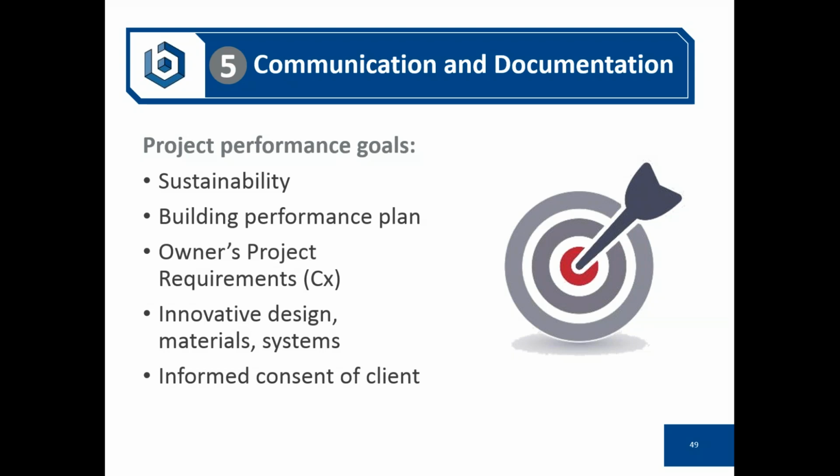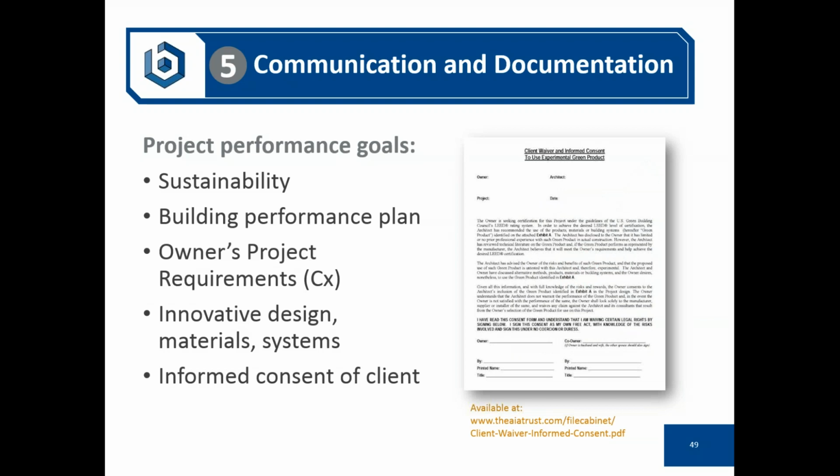If you're proposing something innovative that is not tried and true from your own perspective in the industry, you want to have your client provide informed consent of the systems you're using and the materials you're selecting, and that they understand the risks and rewards. You don't want to be proposing things or actually implementing innovative materials and systems into your project without your client knowing it, okay? So this is a very important documentation and communication issue for you.